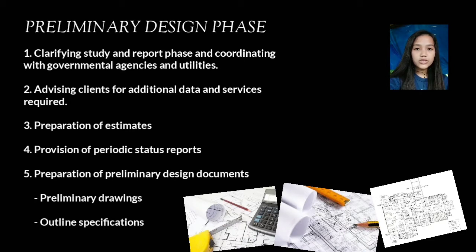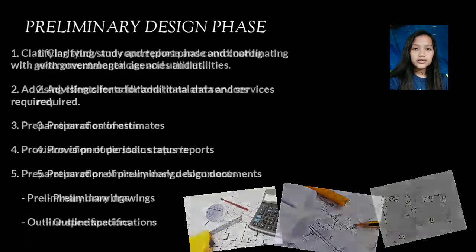and outline specifications. In this phase, analysis occurs after some form of evaluation or funding is available and before design begins. Studies are done to analyze space requirements, issues, the constraints and opportunities of the proposed site, and the cost versus the budget. Preparation of estimates and design documents is made to develop a detailed project program or to investigate certain technical issues in order to determine scope, budget, or project schedule.